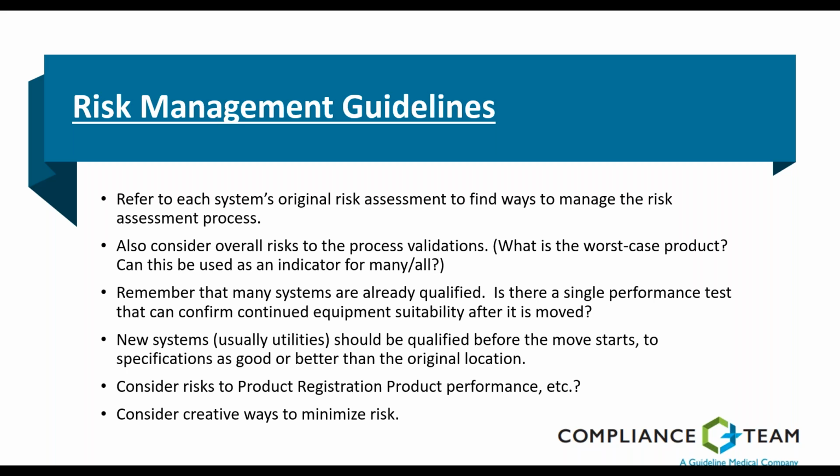And we decided that it might even make sense if we kept those refrigerators and freezers loaded with the same contents they had all along. And we were able in transit to monitor the temperature inside those controlled temperature units. And then we get them plugged in and see if everything stayed stable from the time that we unplugged it in the first location to the point that we ended up in the new location.